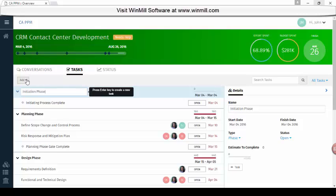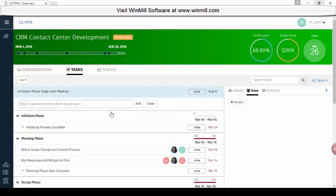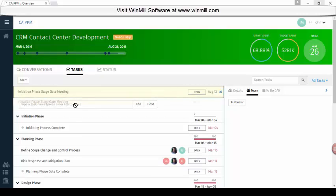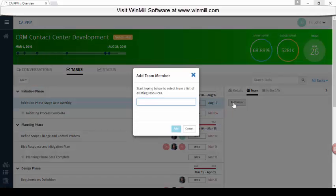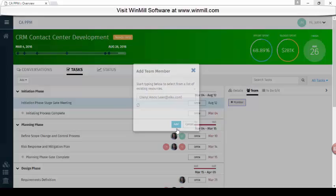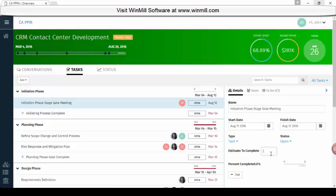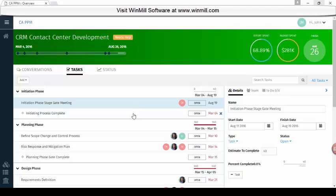Here we're going to add a new task to this project. You simply click the add button, give the task a name, and click add. The task is added to the top, and now we can drag it into the work breakdown structure where we want it to be. We can click on the task itself and add team members — here I'll add Cheryl to the task. We can also add estimates to this task. No need to push save; everything you enter into the UI is automatically saved.